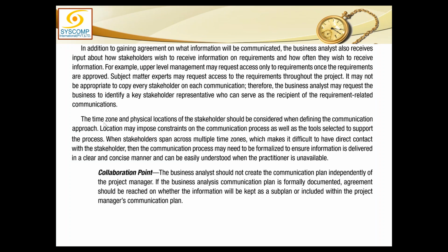So you must take into account the cultural and time zones and geographic positioning. Location may impose constraints on the communication process as well as the tools selected to support this process. When stakeholders span multiple time zones, which makes it difficult to have direct contact with the stakeholder, then the communication process may need to be formalized to ensure information is delivered in a clear and concise manner and can be easily understood when the practitioner is unavailable.